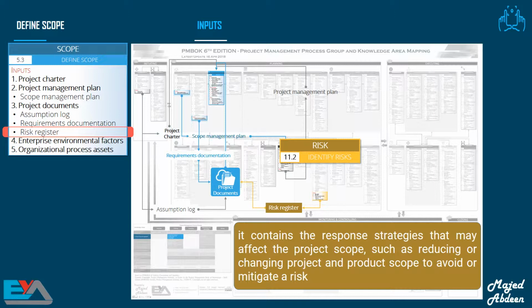For instance, you might miss an important milestone, or a vendor you're using might go out of business. When planning for risk, you will plan your responses so that if these situations do occur, your project will stay on track. The responses won't be actioned unless the situations actually take place. So we need to check, does this risk response strategy change or influence any guidance or procedures contained in the